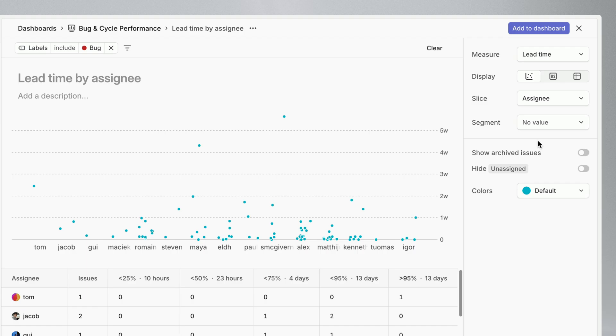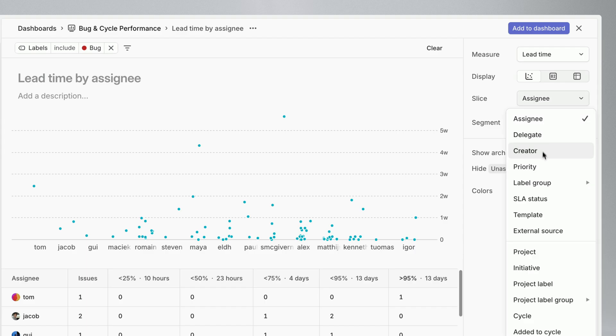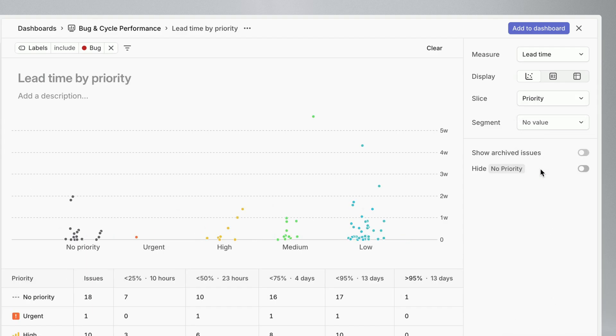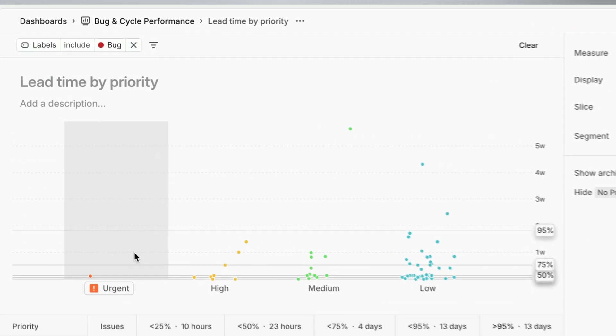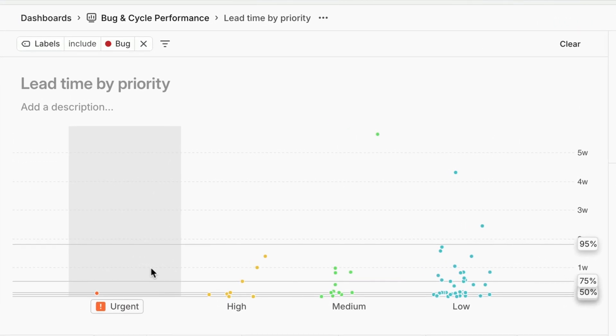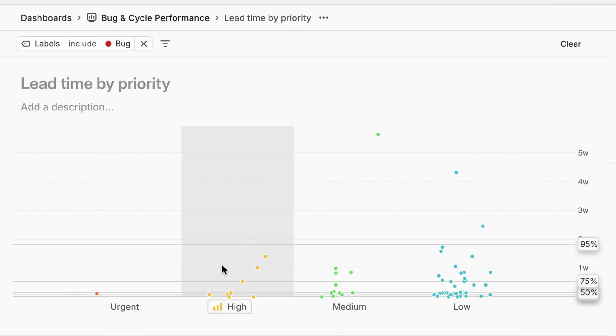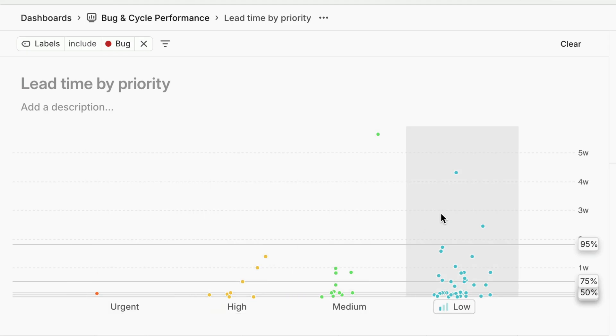This type of graph can show our team's velocity and also reveal outliers. For instance, when slicing by priority what I'll hope to see is that urgent bugs have a very short lead time compared to other priorities, and that even low priority bugs have a reasonable lead time.